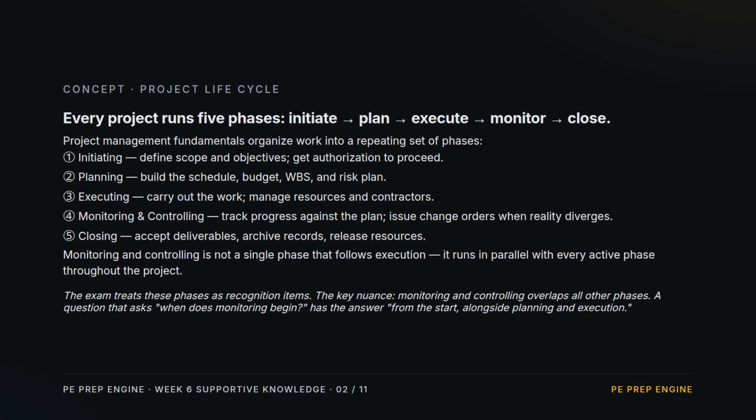Planning builds the schedule, budget, and risk plan. Executing carries out the work. Monitoring and controlling tracks progress against the plan, and it runs alongside every other phase, not after them. Closing accepts deliverables and releases resources.